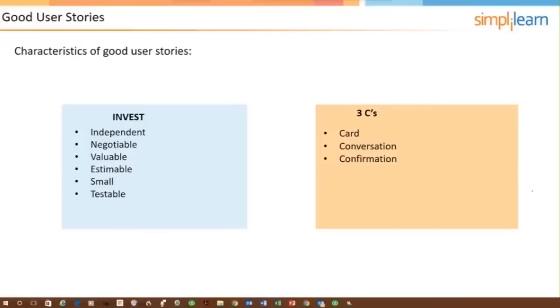I stands for independent. Independent, meaning that each user story stands on its own. When we're doing Scrum, you don't do a user story that won't result in working software. We just talked about the description of user stories, right? So it's a user that needs some kind of functionality for some kind of a reason. And they're all independent. Will they work together?